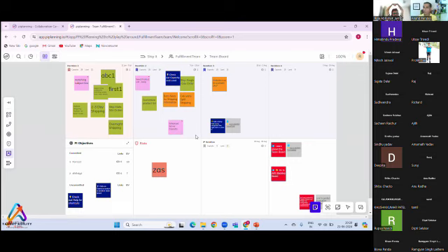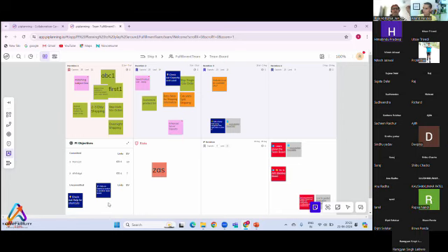In this PI objective, last question. Below that, the uncommitted section: is it compulsory to maintain? If you really want to put something in uncommitted, then put something. It is not necessary that something should go in uncommitted. If you have full confidence in your commitment, there is no need to put anything in uncommitted. Okay, fine. This is for improving your predictability in delivery. Suppose you finish all the user stories early, then we can pick this uncommitted user story at the end of the iteration.